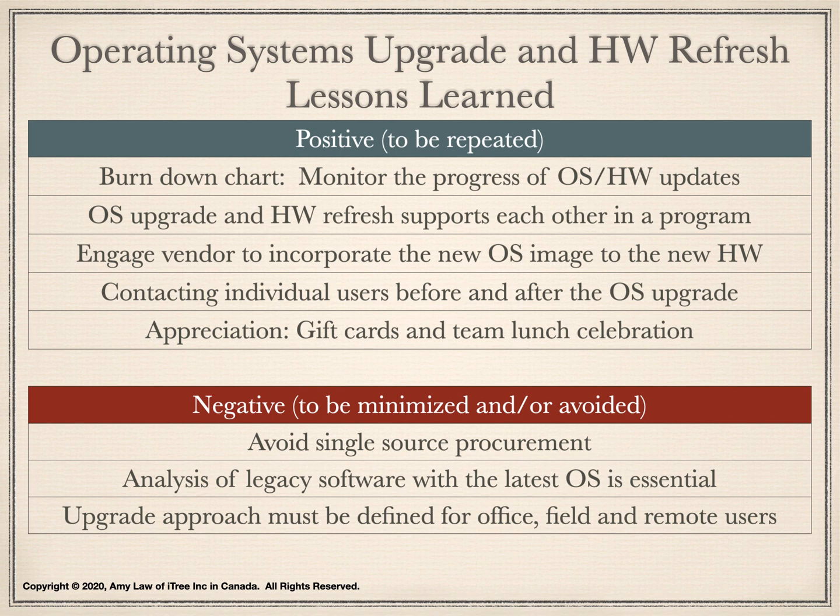Based on the network bandwidth, the project identified a specific upgrade approach for office, remote users, and retail stores. For example, the project will simply create backup and push the operating system changes to the office machines. In some cases, remote locations had a poor network bandwidth. The project would have to ask the remote users to go to the nearby office for a higher network bandwidth in order to complete the operating system upgrade.